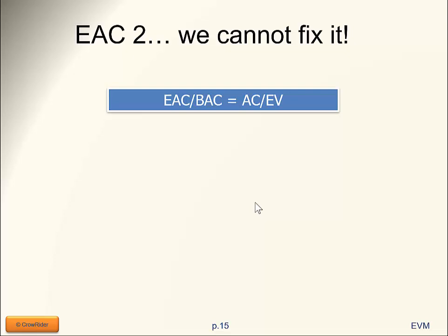The deviation that we've had, we will have at the end of the project, the deviation from the budget at completion to the estimate at completion, what we really will spend versus what we wanted to spend, we're assuming that in percentage, it's the same as what we have spent versus what we wanted to spend by today.